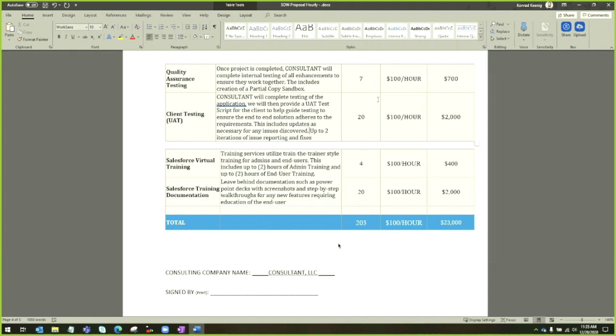Right, and you're just boxing yourself in. Like, send me a list of the issues and I'll fix them. And then I'll even let you go back into the system and retest and send me a list of issues and I'll fix them. But what I'm not going to do is sit here and let you retest and fix and retest and fix for eternity. Like, we have to lay this out. So that includes 2 iterations of fixes.